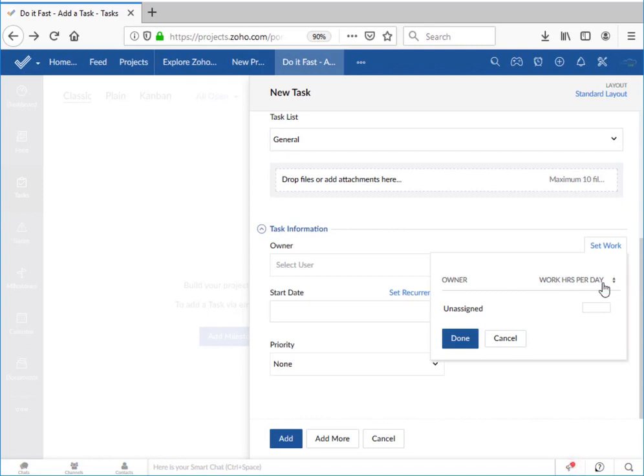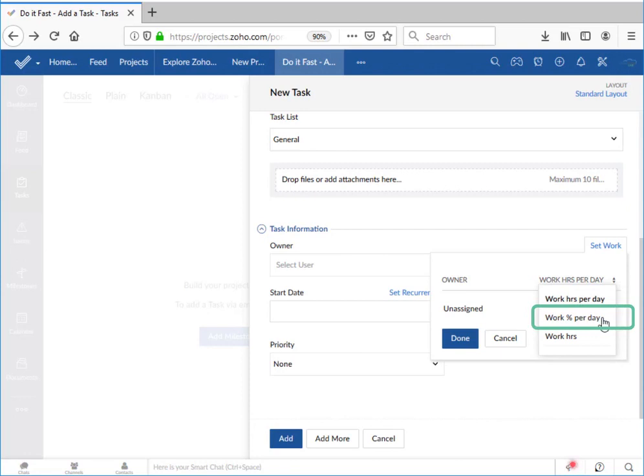Or I can specify the work percentage per day, in which case Zoho will take a fraction of the business day and allocate that to this task.